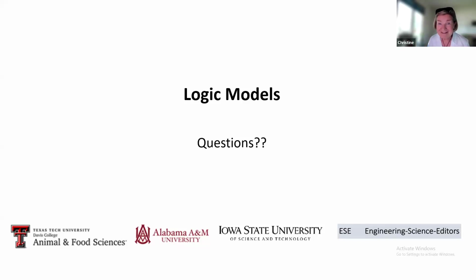And here's another rule of thumb. I do these logic models a lot, and I actually start at both ends. I know what the overarching goal should be. That's in the RFA, so I can put that in there. My PIs have described to me, hopefully, what the problem is that they want to solve. That's the situation. I know pretty much what they're going to throw at it: money, stakeholders, equipment, land, whatever it is.